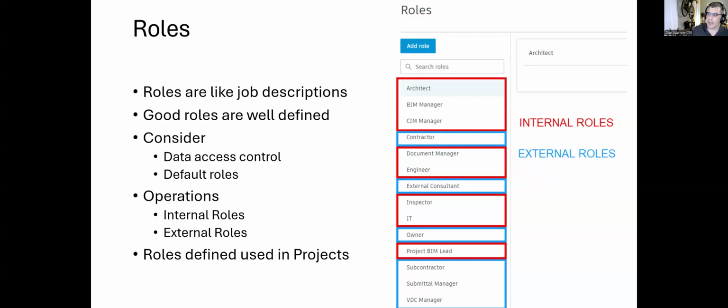One of the things we ran into is we ended up having to remove designer and intern, which were two roles that were in our permission stack. The reason we did that was architects and engineers kept going in and finding users that had the role architect assigned to them, and they would change their role from architect to intern, because I guess it offended their sensibilities. And then they would effectively lock that person out of the project.